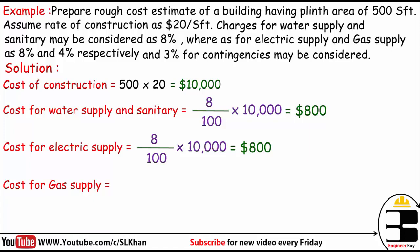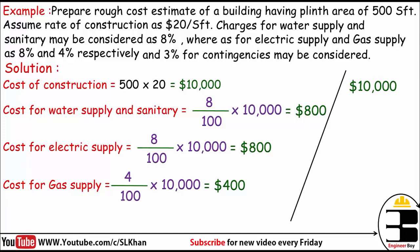Then comes the gas supply, which is only 4%. To remove the percent sign, we divide by 100. If it is 4 in 100, then how much should it be in $10,000? We get $400 as the cost of gas supply. Adding the cost of construction ($10,000), water supply and sanitary ($800), electric supply ($800), and gas supply ($400), the total equals $12,000.